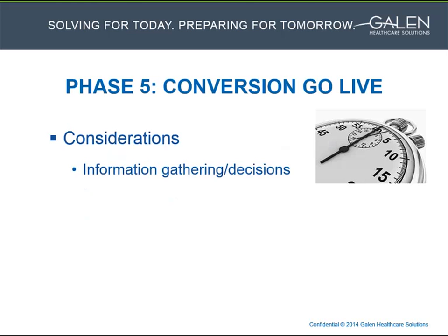An example of this would be if the SOW stated that only verified results will be converted and that they would be the only results considered in scope. Well, if that's the case, then there will need to be a go-live action item track to make sure that, for example, providers verify all outstanding results before the source system is taken offline for the conversion. Or at a minimum, the client would want to discuss an alternate plan with their lab vendor. Either way, an issue such as this one would need to be tracked and discussed as part of go-live planning.